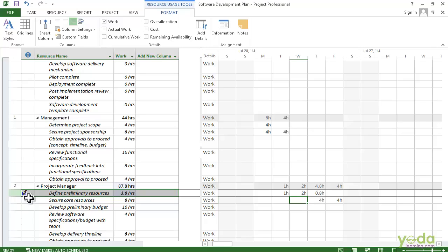You may be able to overlap the tasks. That way you can eliminate the resource over allocation with only a small impact on the project finish date. I hope the concept is clear to you.